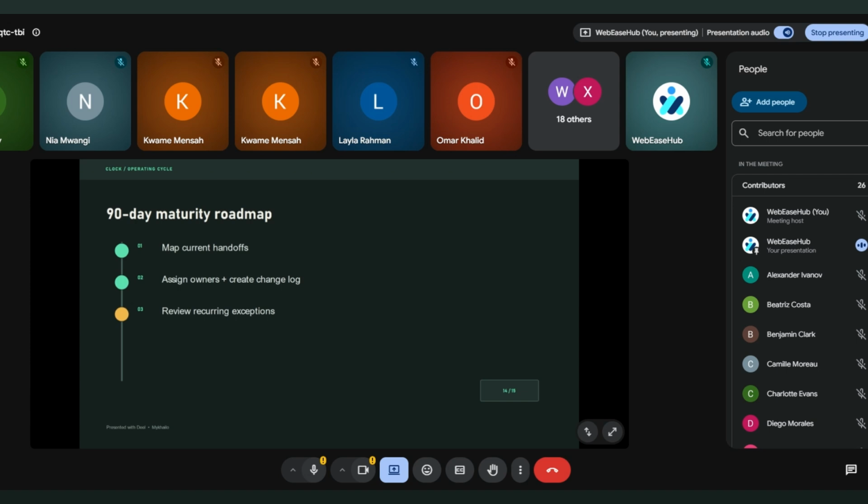Some requests are emotionally urgent because a person is frustrated, surprised, or under pressure. That does not mean the request should bypass every control. It means the team should respond promptly, respectfully, and through a known decision path. The triage log should capture the date received, category, requested outcome, current cycle eligibility, impact assessment, decision owner, final decision, communication status, and preventive follow-up. Over time, this log becomes a source of operational improvement.